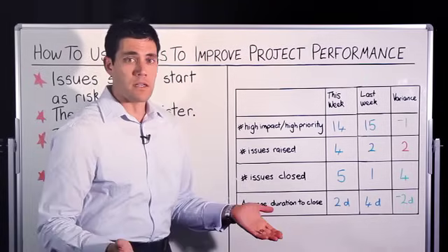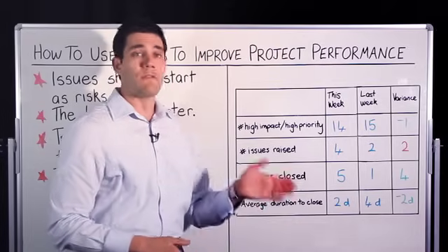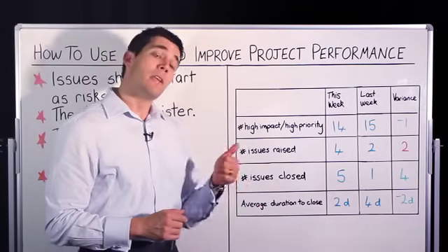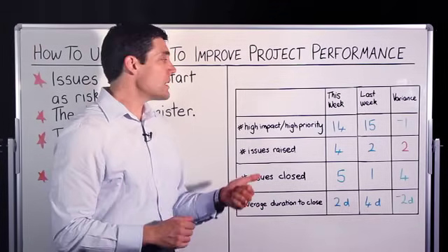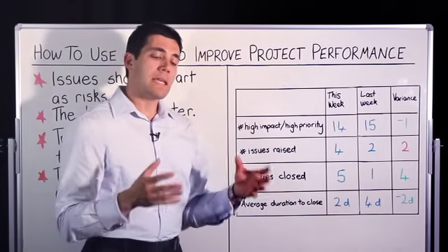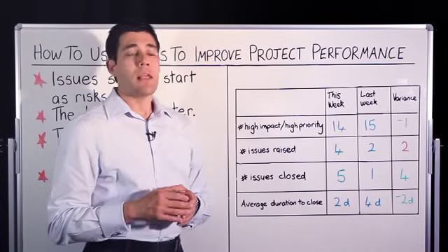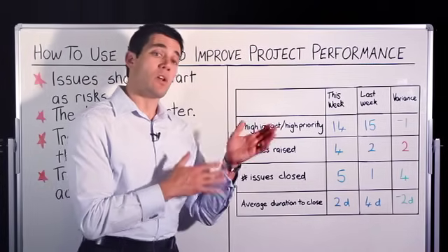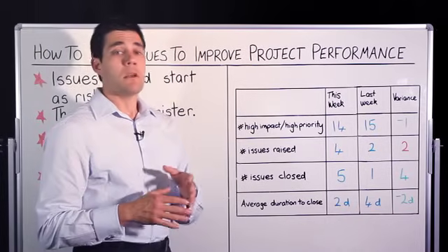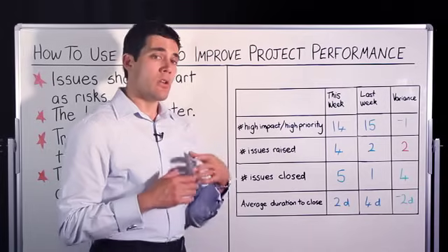So let's say you do Friday status reports. On Friday, how many issues of this nature do I have open right today? If you track that on a week-by-week basis, you can get a sense of what your variance is and see that you've got a baseline of issues that are open at a given time and whether or not that's going up or down. Now, it may be okay for one week for it to go up a little bit and for another week to go down, but if you see that count actually start being driven up week by week, you know that you've got a problem.